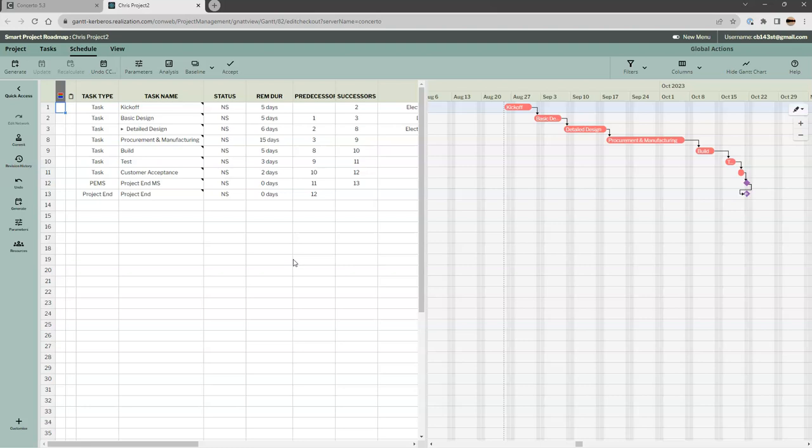In the nature of planning, we're using these types of milestones to help focus our capacity and attention to the part of the project we're actually executing today. We may have a large multi-year project where we want to place a contractual milestone at maybe the six-month point, so I can really focus my capacity for the next six months. I can see the impact to a milestone which is closer in — something I can really manage to.